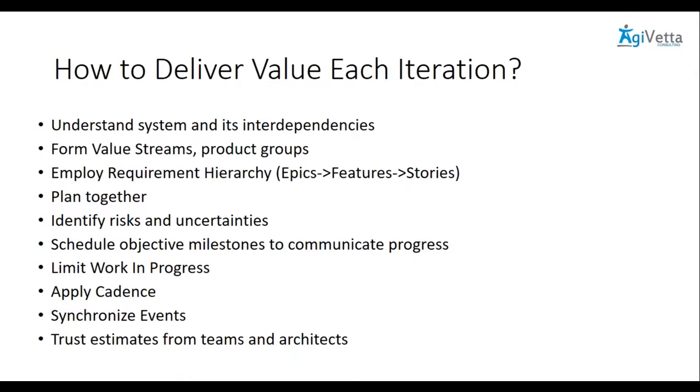So every 2 iterations, okay, every 3, maybe every 4. Let's say every 4 iterations, all of our teams are going to together deliver one integrated solution to the customer. Or going to make it ready so that the customer may want it, may not want it, but we have it ready. That is what we call a cadence.